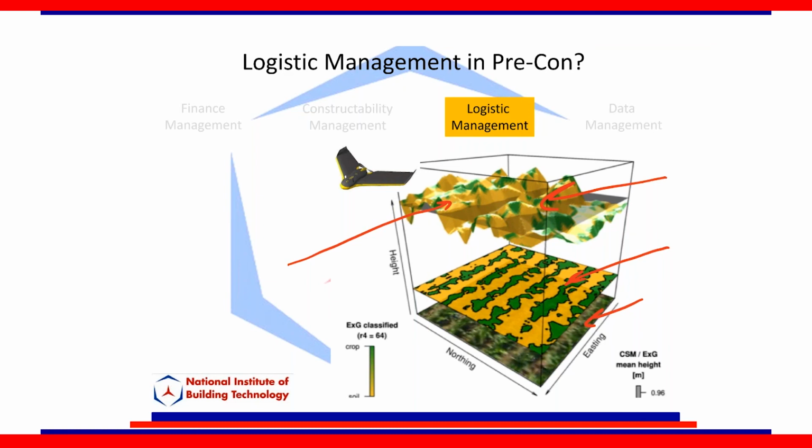Things like that. So just by running a scan, it literally takes 4 hours to run a large footprint of a green field where you're developing. This helps you manage your stream waters, your storm water management, your percolation. You get into so many statistics. You can understand where your services are coming in, where you're putting your washing racks, where you're putting your trailers and things like that. So this tool is becoming more and more popular.